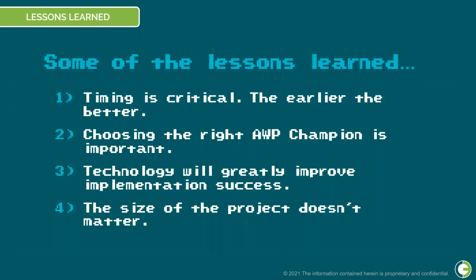So let's have a look at some of our lessons learned. Firstly, timing is critical. The earlier, the better. And I know O3's produced a blog post about this, that timing really is everything on a project. Too many times we get approached by contractors, owners, EPCs saying, "Yes, we want to do AWP." Well, yeah, and our project is just starting to pour our foundations and we're going to start mechanical work next month. You've already lost a lot of the benefit that you can find from that.